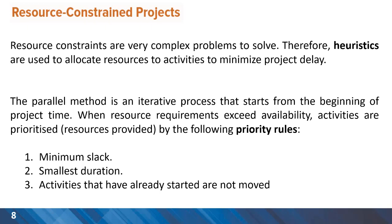Resource-constrained projects are complex problems to solve. Very often, heuristics are used for solving such complex problems. There is a rule of thumb that most heuristic methods use for resource-constrained projects: prioritizing activities in terms of resource provision when the slack or leeway for the activity is minimal. Also, we give priority to smaller duration activities. And the third rule of thumb is that we don't move activities which have already been started.